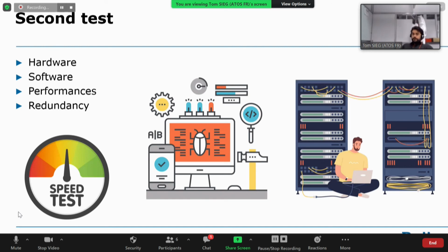In this case, you have two kinds of HPL. You have the mono-node HPL, where you will push the job on each node, and you have the multi-node HPL. The mono-node HPL is really useful to test the performance of an individual compute node, and also to test all the components working together, because the HPL is a real job.